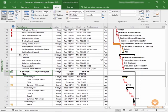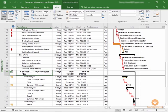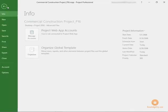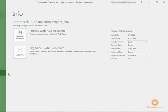In order for Microsoft to view your subproject as summary tasks, which is what is necessary for it to be considered in the critical path, we have to tell Microsoft to view the subproject as summary tasks. So we can do this by navigating to File, going down to Options.